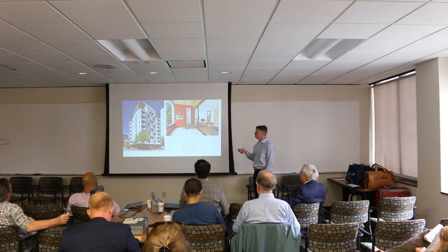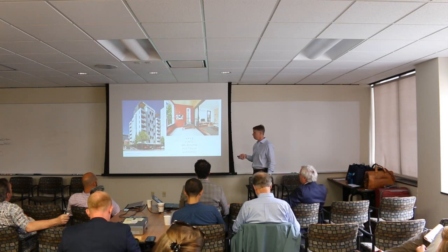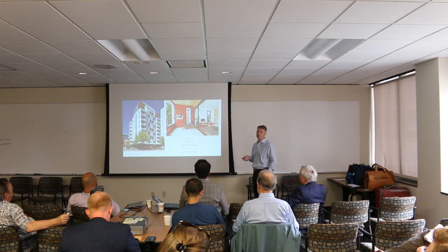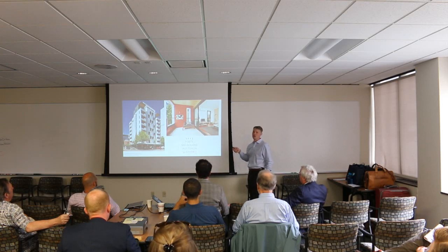Forte, this is one of the best stories out there. I met with David Cracknell with Lend Lease. He was the superintendent on this job, had never done a wood job in his life, was a steel and concrete guy his whole life. This is a 10-story project. They poured the elevator shaft, reinforced concrete as a lateral system, only up to five stories, because he had no idea how fast the CLT was going to go. And his biggest regret was not pouring that reinforced concrete shaft the entire 10 stories.